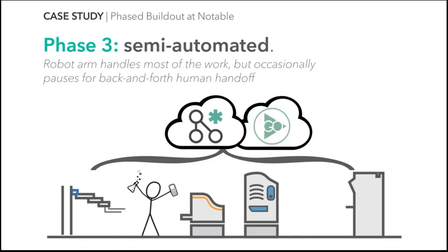In the theme of parallel development, you may not actually know if you need those instruments yet. You may not even know which instruments you need. But again, you still want to automate the steps that you're more sure of. So by adding these pause points in the middle of your process, that gives you the freedom to automate the steps that you're sure about while still leaving things open to your scientist's best judgment in other areas where you're more uncertain.